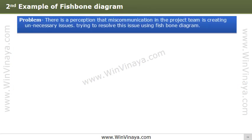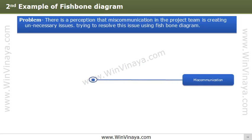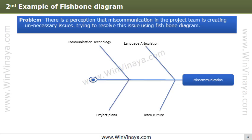Another example: problem statement — lots of escalations and firefighting happening in a project due to miscommunication. To understand why there was miscommunication, we use the fishbone diagram. We list various categories of causes such as language articulation, communication technology, team culture, and project plans, then identify the cause under each category and arrive at reasons using the five whys technique.